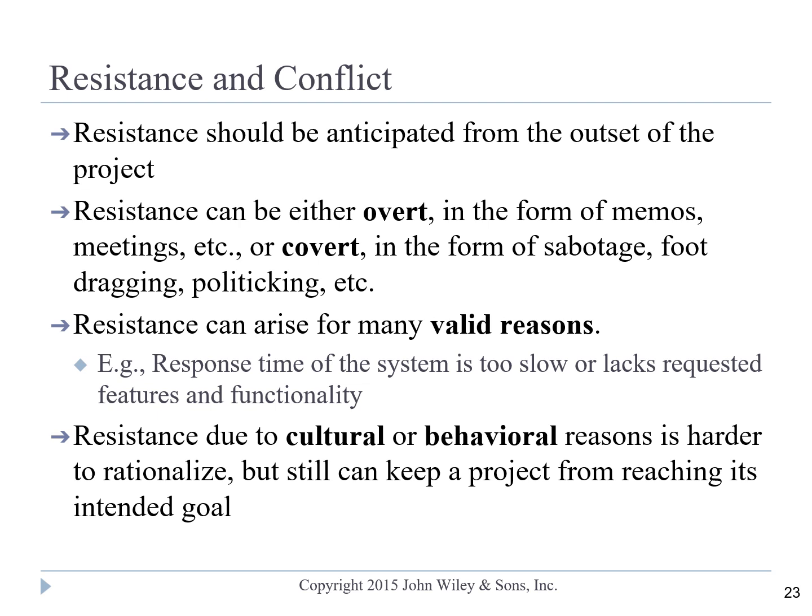And sometimes the resistance may be valid for the change. Maybe they are not getting all the features that they were promised to receive. Maybe the system is not performing as well as it was promised to perform. In all these cases, again, communication is the most important thing, to make sure everybody understands why, if some features were dropped, and that you will get back to them and maybe add those in the future.